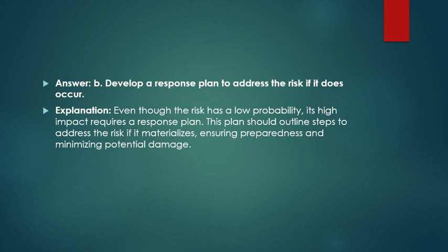Answer is develop a response plan to address the risk if it does occur. Even though the risk has a low probability, its high impact requires a response plan. This plan should outline steps to address the risk if it materializes, ensuring preparedness and minimizing potential damage.